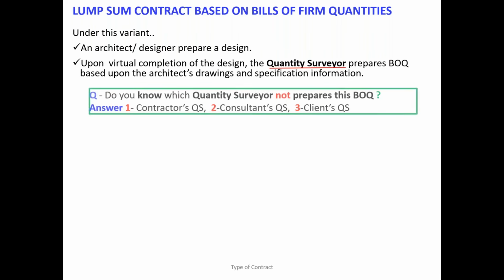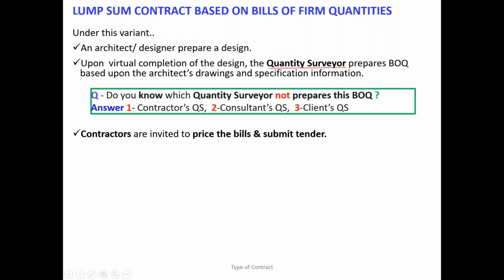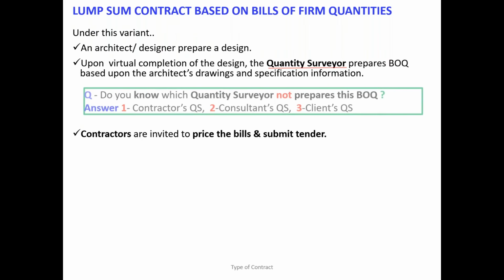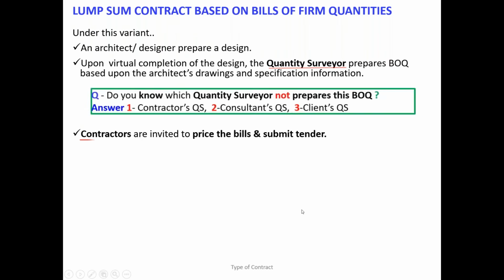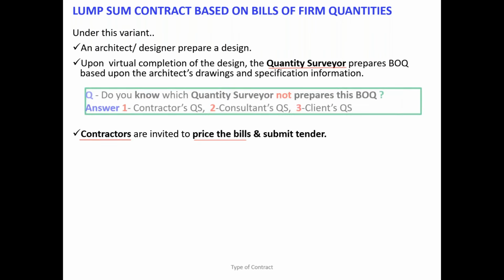So that's what I asked in the question. Once the BOQ is prepared by the consultant or employer QS, now contractors are invited to price the bill of quantities and submit their offer. That is called a tender.